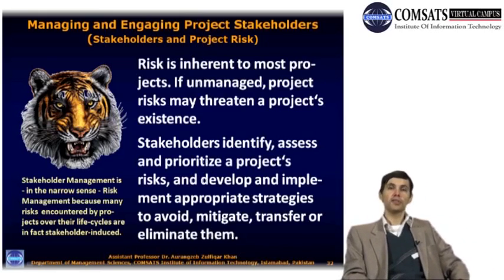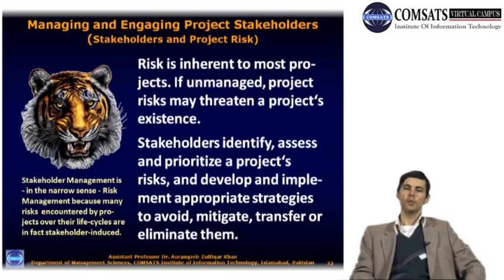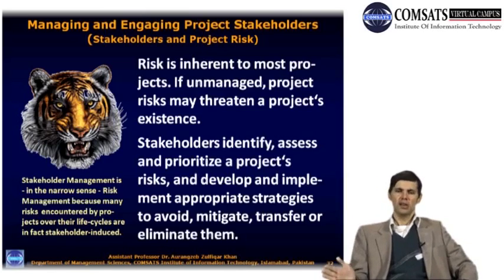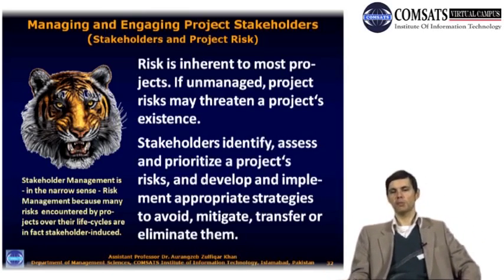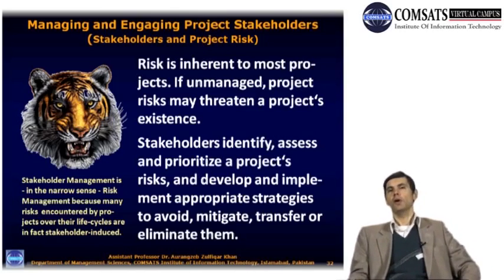Now again, it's the stakeholders who identify, who assess, and who prioritize a project's risks. Not all risks are the same. There are some risks which could be very serious if they really come to fruition for a project, and there are other risks which are maybe smaller, have smaller consequences. So it's really the stakeholders who identify, assess, and prioritize a project's risks, and it's also the stakeholders who develop and implement strategies to avoid, mitigate, transfer, or eliminate.